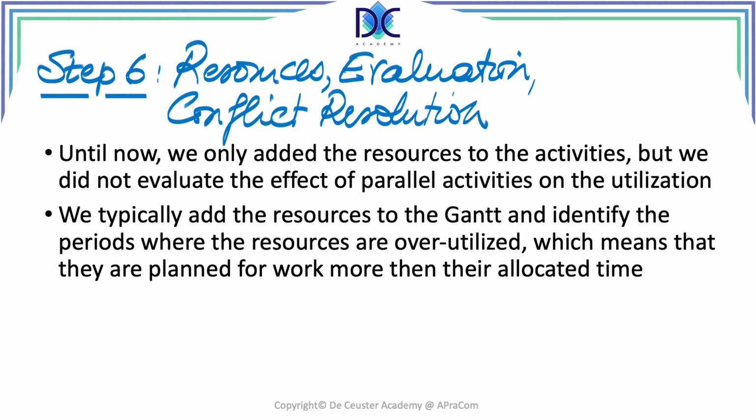Now, sometimes when you have resources dedicated to your project, you may include overtime, but overtime always leads to a reduction of performance, and people, when they work too much, will not perform properly anymore. Keeping people on the project will just reduce their output, and it will not help you.